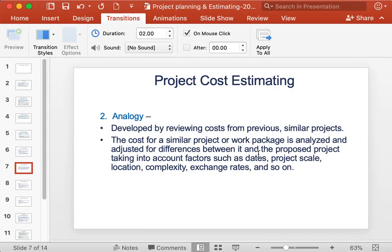Another method of estimating project cost is using analogy. This is done by reviewing costs from previous similar projects. The cost of a similar project or work package is analyzed and adjusted for the differences between the project being compared with and the proposed project, taking into account factors such as date, project scale, location, complexity, exchange rates, and inflation.